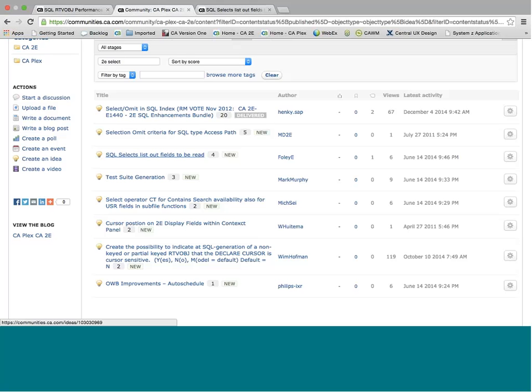If one idea is voted by lots of people and it might save, it's hard to figure some of this stuff out, but if it might save an hour every time we do an installation, if you weigh that against an idea that's a bit lower down the board, but it's going to save hours every week for some reason, then again, that's a balance.